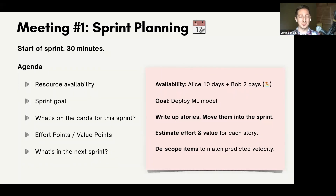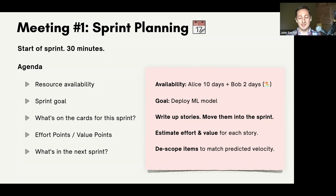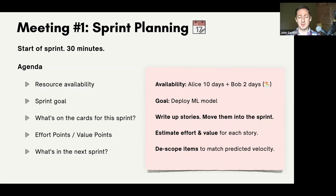Here's our agenda for what I think is the most important meeting: sprint planning. At the start of sprint, maybe 30 minutes. Find out resource availability — let's say Alice is available for the full 10 days of a two-week sprint, and Bob is only available for two days because he's on holiday. Then what's your goal? We want to deploy our machine learning model. So we write up our stories, figure out what's needed to achieve that goal, select stories to move into the sprint, and then go through an estimation process — estimating effort and value. Through that, we identify if there's anything with huge effort and high risk, or high effort but low reward, and de-scope those items as appropriate.